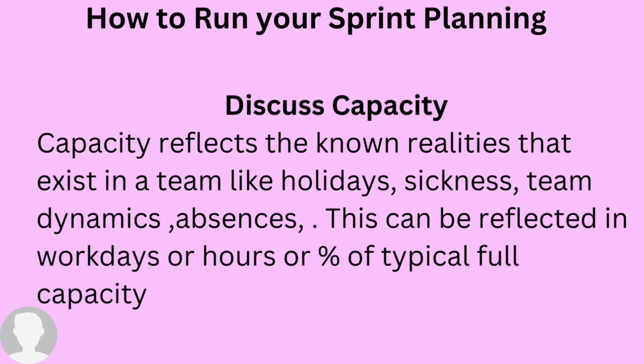But this time around, this sprint, you have a holiday. Let's say it's Labor Day, and the day before Labor Day is also a holiday. So all the team will be taking time off, like 2 days off. So that leaves us at 80% capacity. So your team was used to committing to 100 story points at 100% capacity, and they did great, right?